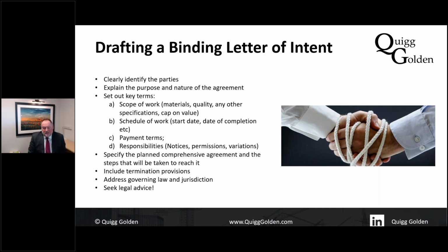British Steel then delivered these nodes, but did not deliver them in the order they should have been delivered, and caused a horrendous delay to Cleveland Bridge because they couldn't erect the steel structure out of sequence. There's no point having the last node you need at the start and the node you need at the start at the end of the delivery cycle.